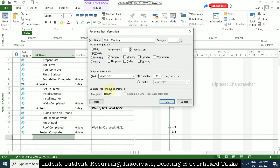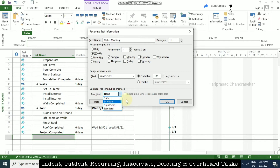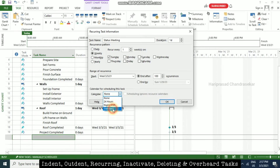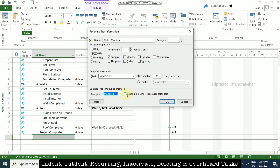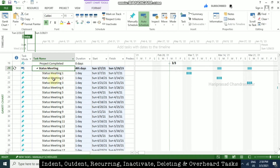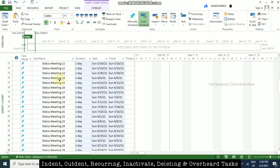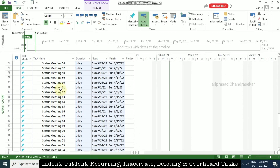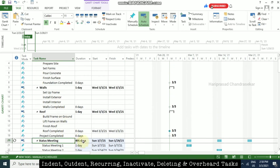You can also set a calendar for scheduling the task and select whichever calendar you have. You can put standard and there is also an option to ignore resource calendars if needed. Click OK with no calendar selected. Immediately we will have multiple status meetings automatically created for us, all under one section — we have 495 days worth of occurrences.